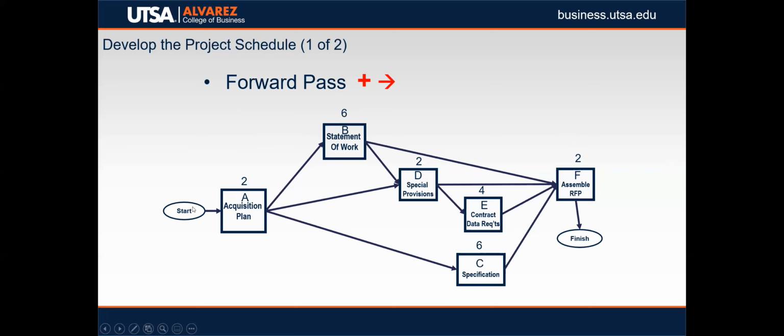When we start off a project, we could call it day 0. So in this example, we'll start off with day 0. And all we're going to do is add, just like it says here, 0 plus a duration of 2 means we finish at the end of day 2. Pretty simple. Next, we'll take this 2, and you'll see these arrows, they just point to the next cell.